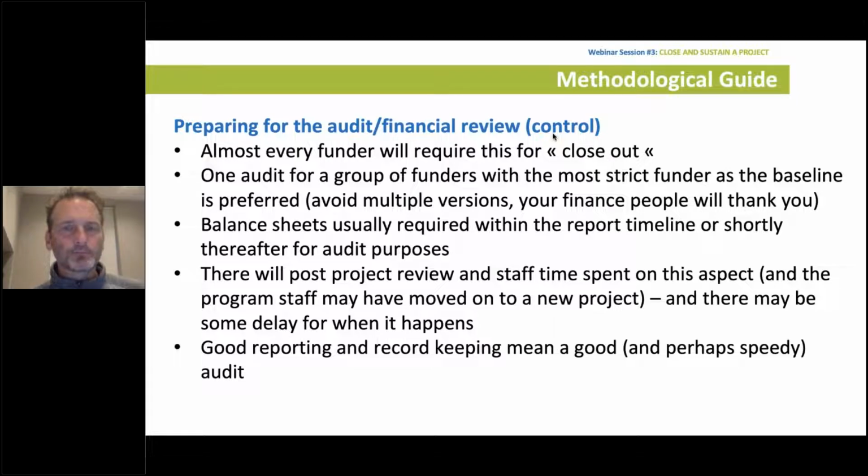And I mentioned this, but one audit with a group of funders is really important, especially if you can align it to the most strict, avoiding multiple versions for multiple funders and keeping it more consistent. You'll thank yourself, and if you have finance people, they're definitely going to thank you, because they won't have to cut those numbers in a lot of different ways.